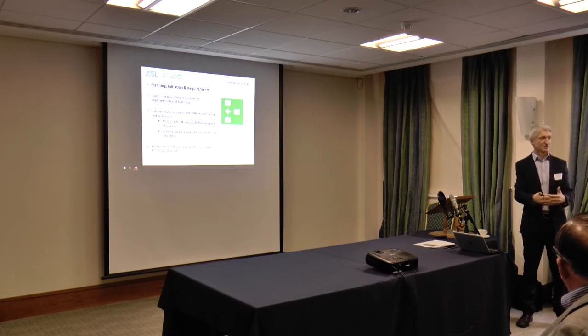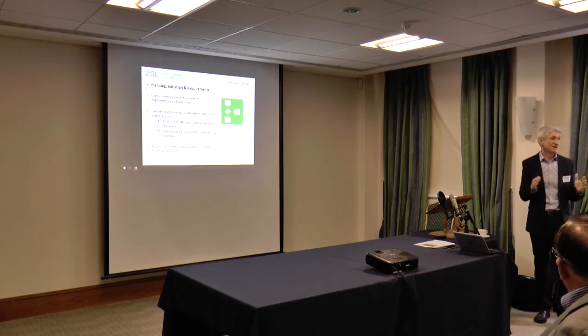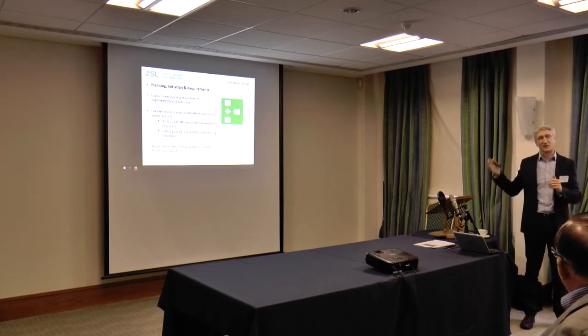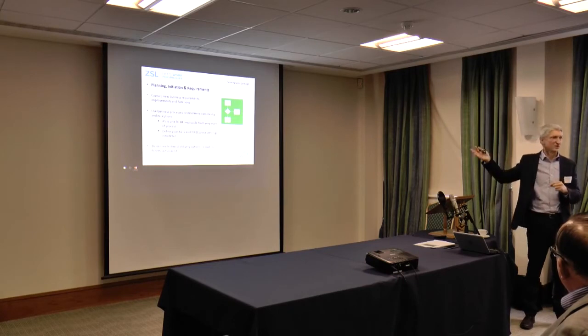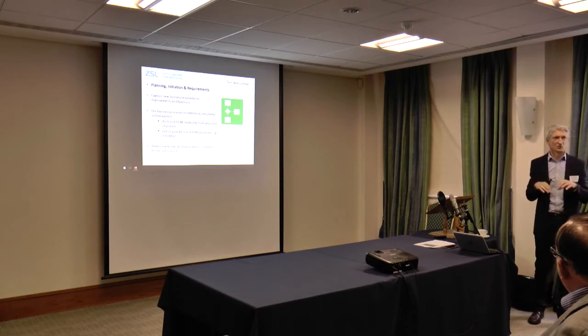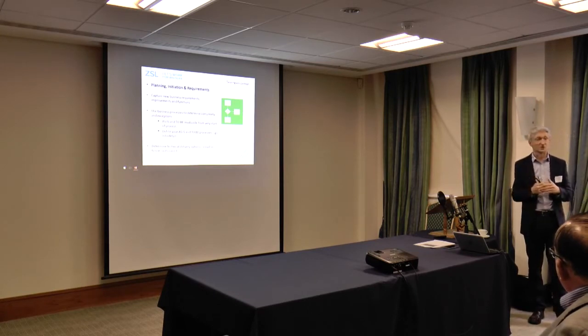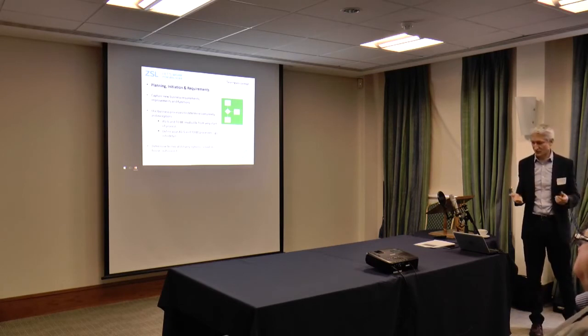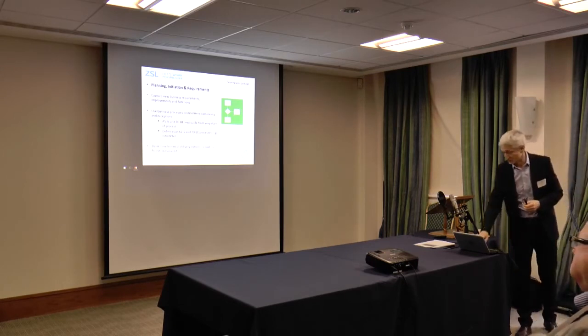If you give it to someone else, it might make you feel comfortable when you give it to them. When things go wrong or you need to have some control over it, remember you're only as good as the person at the other end and the service levels you've negotiated. And actually you can't just send your techie down to press the box or reset it. And again, for us on premise, because Whipsonade is in the middle of nowhere anyway, and London Zoo is not exactly well connected, it was more important for us to keep the technical infrastructure on the site, because if it went into the cloud and we lost the connectivity, I could do nothing. But again, different organisations will have different costs, profile, risk issues and models to adopt.